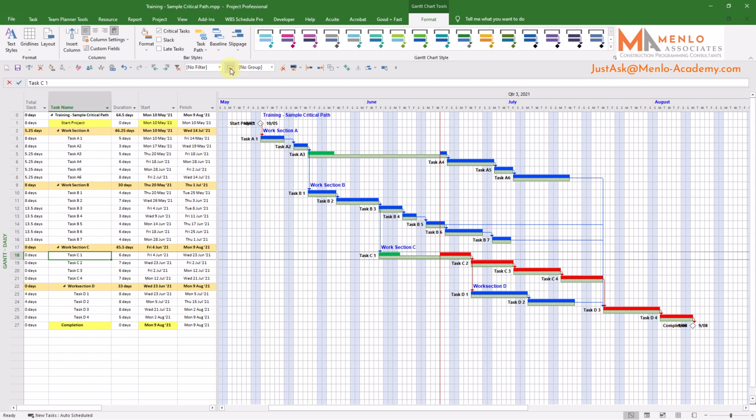The reason for this is that we want to control the narrative of our reporting. We want to be focusing any questions and discussions on the changes that have happened since the last progress report. Any events leading up to previous reports have already been dealt with and shouldn't need to be rediscussed. The original contract baseline is still available and is the yardstick that any extension of time claims will be measured against. The later baselines are there purely for your benefit, to provide focus and map the evolution of the project over time. They're there to make it easier to report and analyse the cause and effect of any events that delay or affect the course of the project delivery.